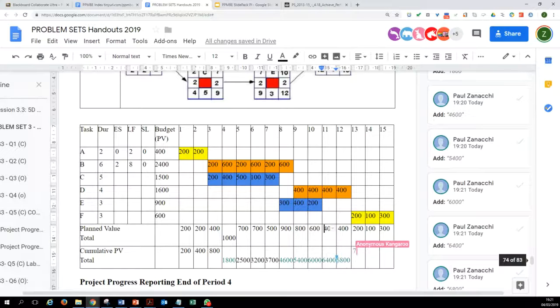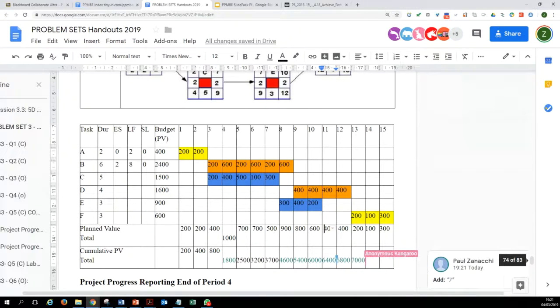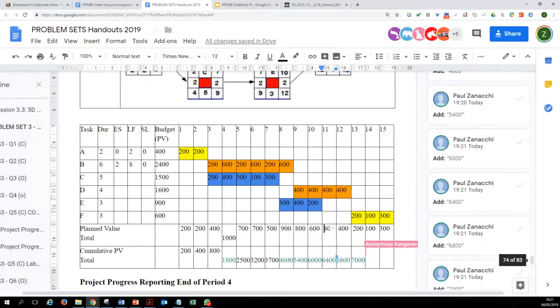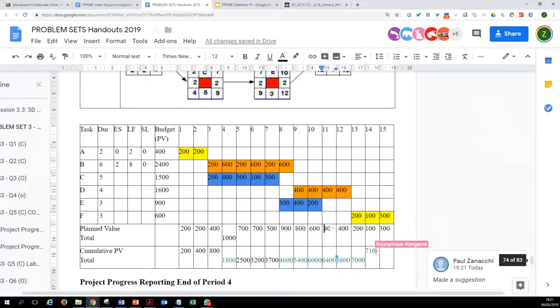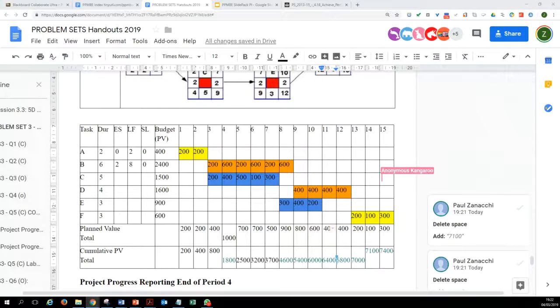If there is a very major change introduced, maybe the client has radically changed the scope of work, that may be grounds for introducing changes in the baseline, but the baseline is a key project document, so the PV line or baseline should be taken seriously.